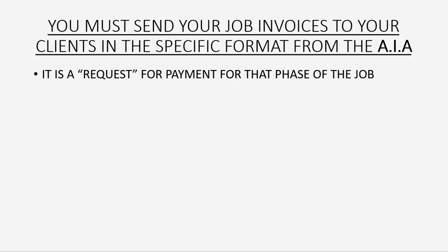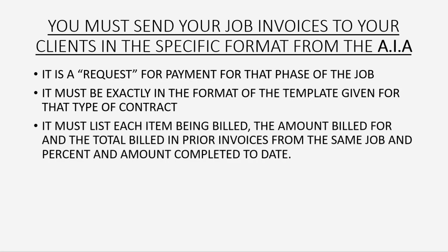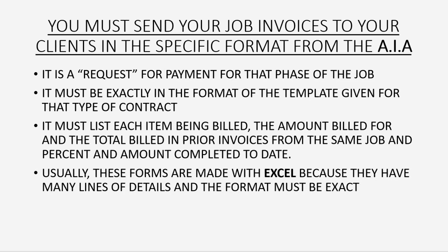This is a request for payment for that phase of the job. It must be exactly in the format of the template given for that type of contract. It must list each item being billed, the amount billed for, and the total billed in prior invoices for the same job and the same percent and amount completed to date. Usually, these forms are made with Excel because they have many lines of details and the format must be exact.